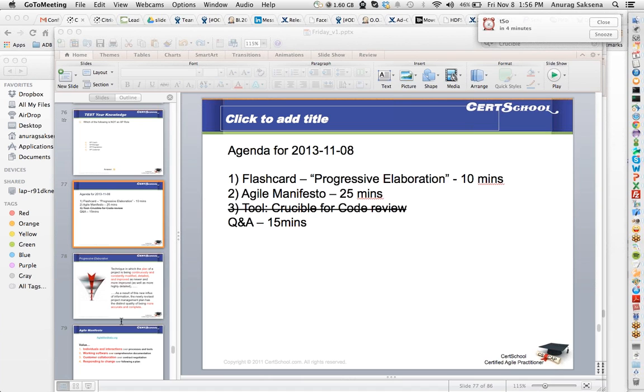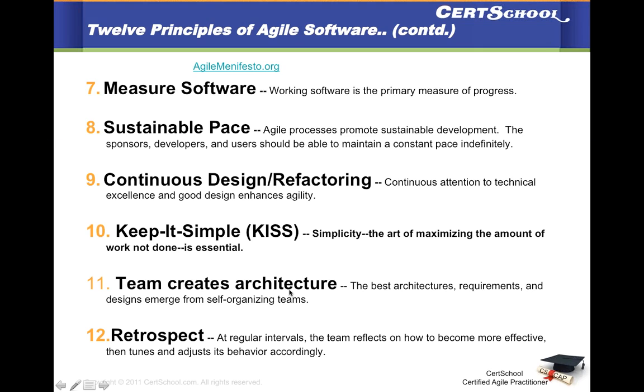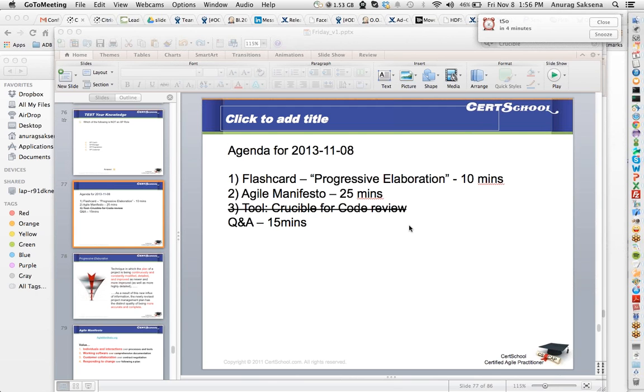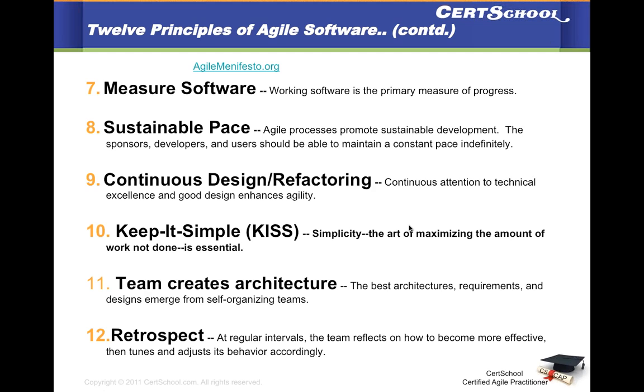How do you define scope creep separate from story evolution? There's no such thing as story evolution. Once a story is written, once it has a description and acceptance criteria, that story is expected to be ready for implementation. It is not something that is expected to evolve. Okay, I think you meant evolving requirements.